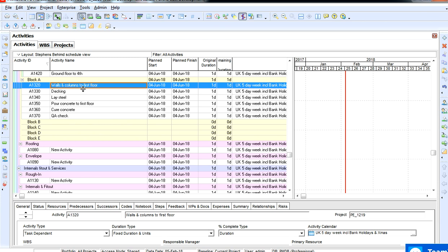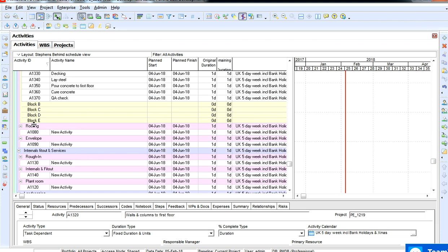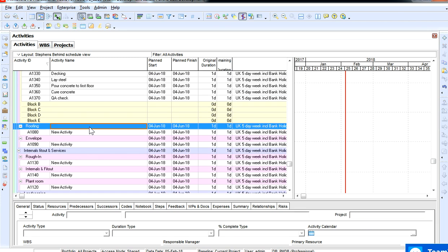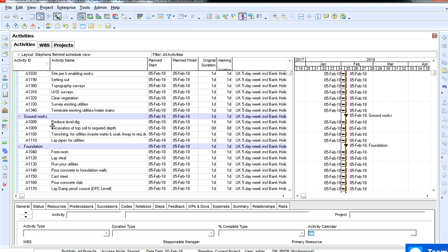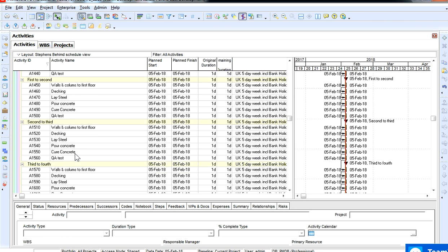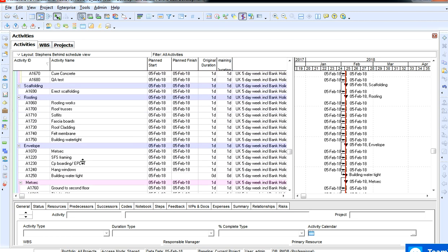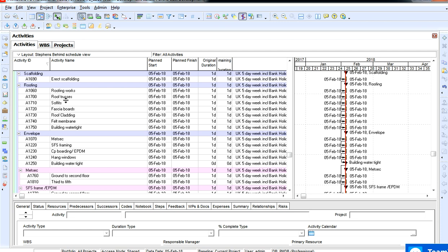Once you've done that, you've completed your frame. Now, with the roofing, the roof will be concrete, but you'll lay a damp proof course on top of that, right? And the activities for that had been previously done in a previous lesson. If you come up to where the roofing activities are, you felt it, rain screen on top of it. So weatherproofing, basically the roof works, the roof trusses, the soffits, fascia boards, all of the rainwater goods. Okay, so RWP, rainwater pipes, the guttering, etc.